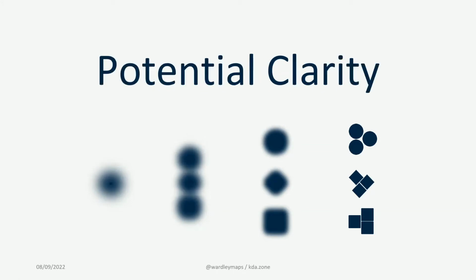Evolution can be, to some extent, replaced with the potential clarity. So if you don't have knowledge about a particular capability, it doesn't mean that it's on the left-hand side. It just means that you have to check whether there is knowledge available in the market, because if it is, you may have a knowledge gap, and that's the simplest way to remove, let's say, uncertainty from your project. We will operate under the assumption that you have already done this step. You have explored the market, you know what is possible. So things that are left are things which nobody else figured out.